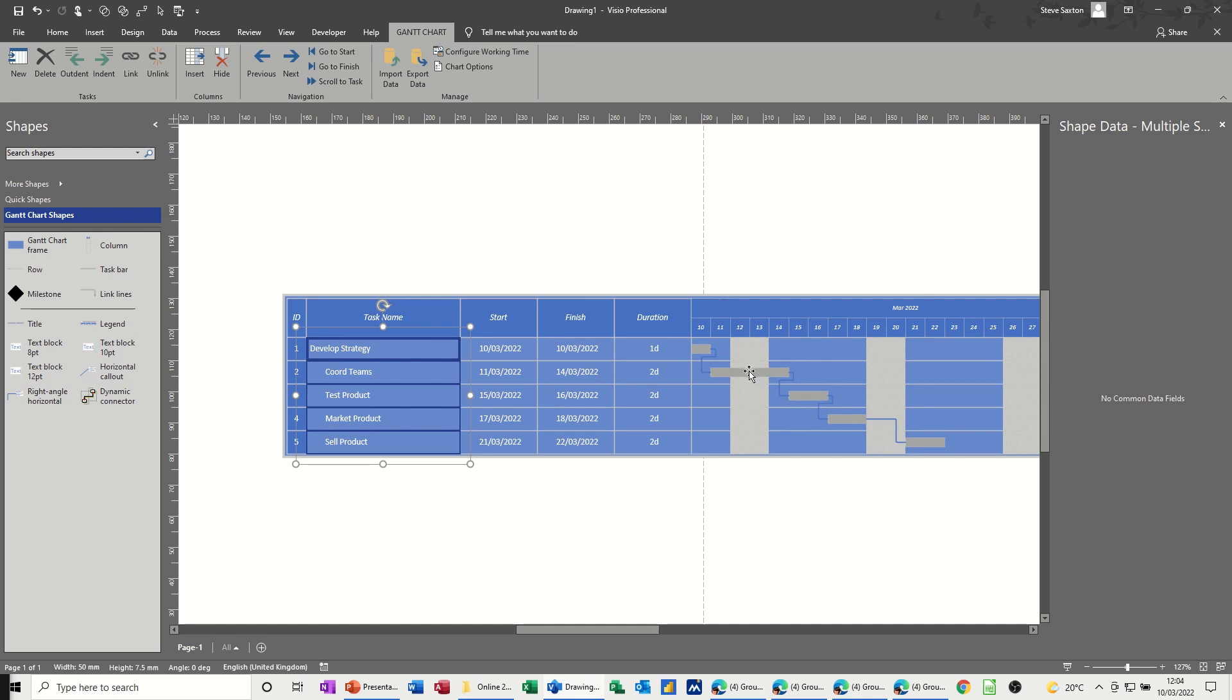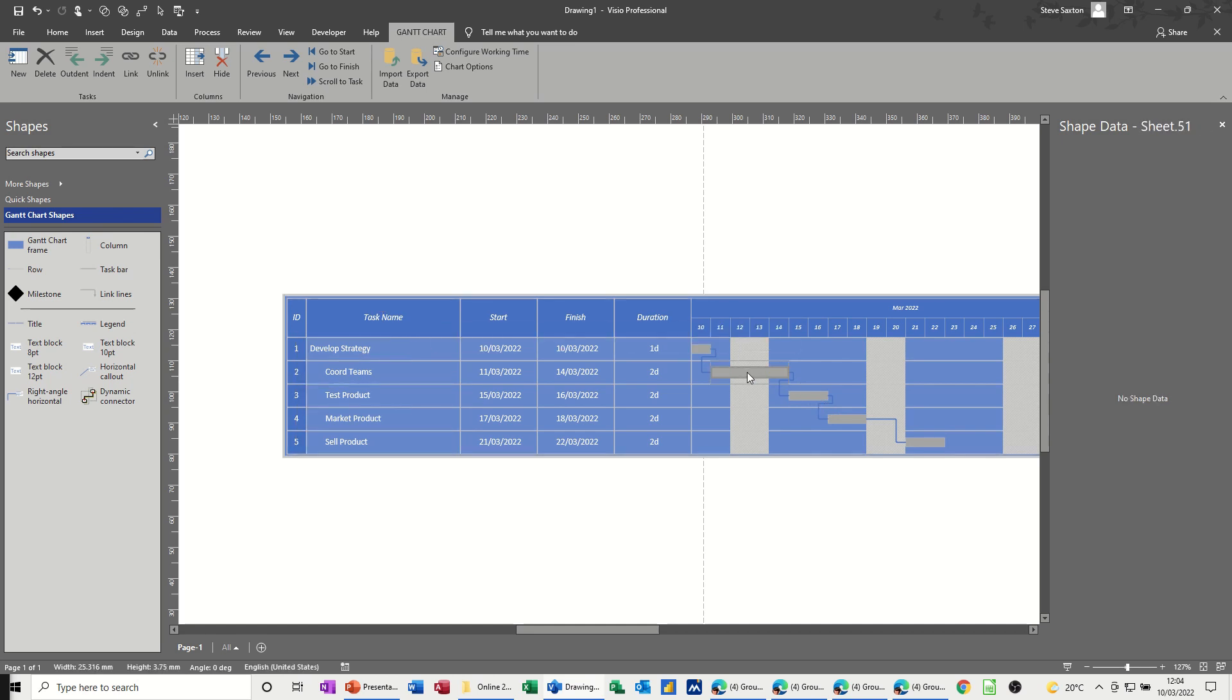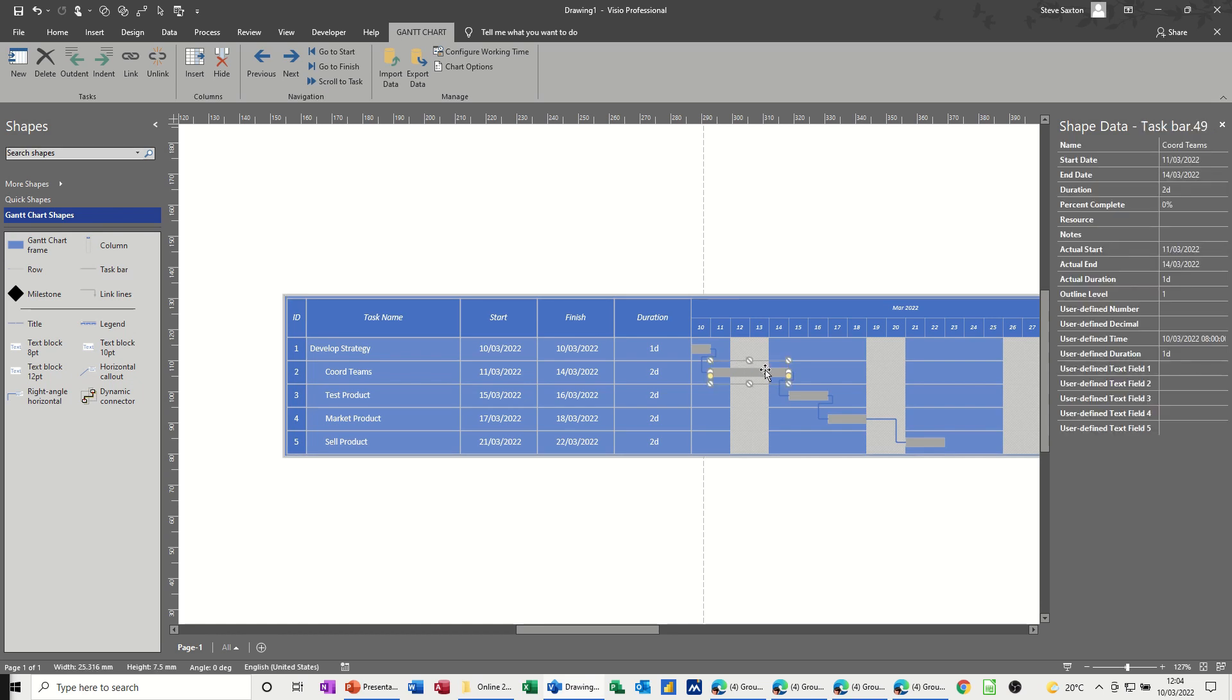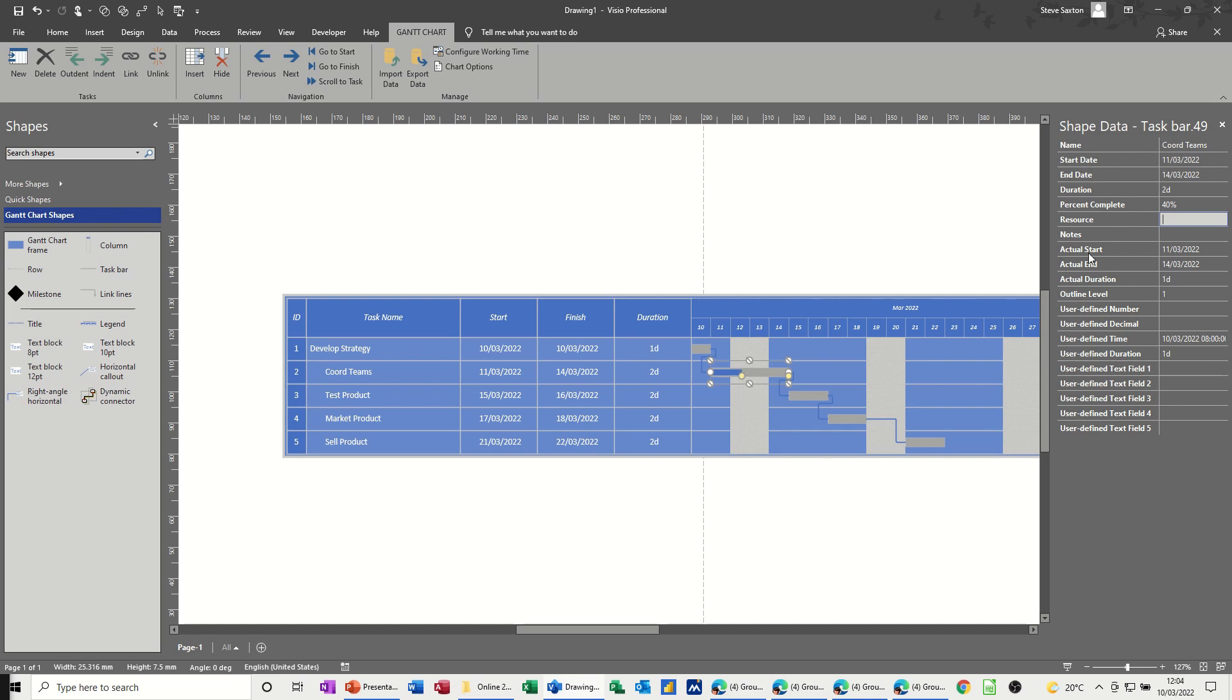Now if I click on one of these, not double click, if I can get it, there we go. The shape data appears for that task, and in the shape data you've got all of this information as you can see there, so the duration, percentage complete, if I change that to 40% for example on this one, you get a percentage complete bar appearing there. You've got an area to type some notes, and then you've got some custom fields.